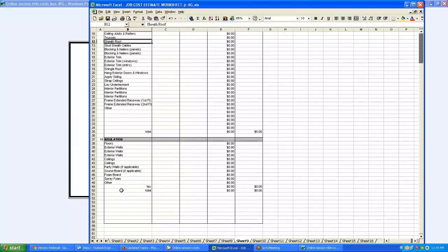You can get your installation company to come in and just give you one price. It's going to be $10,000 to insulate the house. You have to put a 1 in the column to get it to carry forward. In Massachusetts, we have a 5% sales tax. That's why this tax line comes in here. When you purchase, it's up now to 6.25%, so this would have to be changed to 6.25.